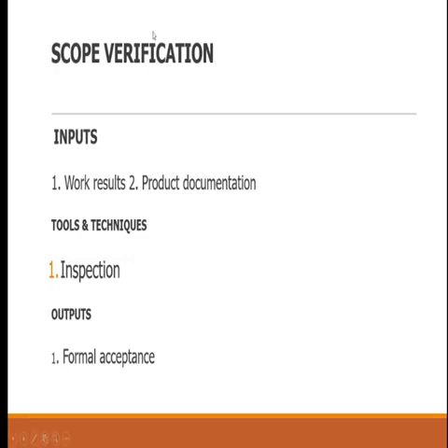So verification, write this one down, must be done after every phase. This is an exam question. I just gave you one answer to an exam question, right? Every scope must be verified phase by phase. Don't verify your scope at the end.